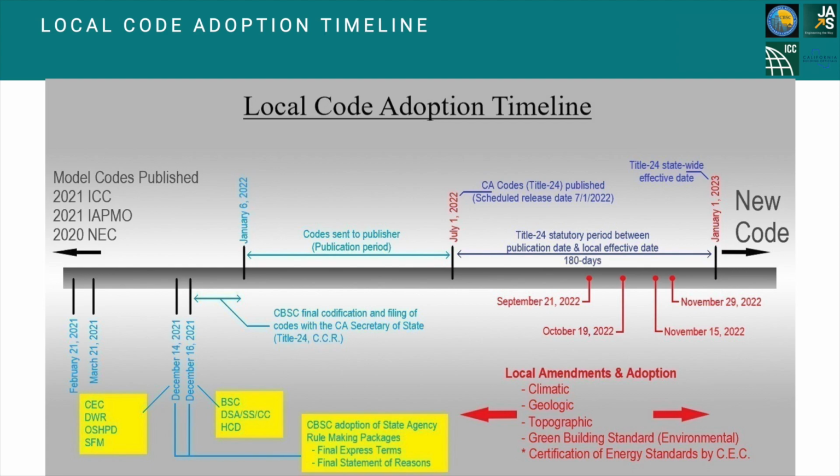This represents the latest opportunity on which the code official can utilize the appeals board to conduct the first of 2 public outreach meetings. If any public comments are received during this meeting, they can be considered and addressed prior to the second public outreach meeting that will take place on October 19th. By working backwards from January 1st, 2023, local code officials can determine their own opportunities to complete public outreach hearings and secure City Council approval in order to meet the January 1st effective date.